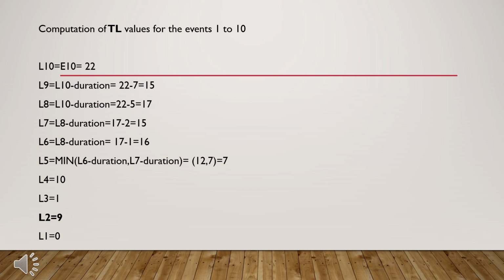L5 equals min of L6 minus duration, L7 minus duration, equals 12, 7, equals 7. L4 equals 10. L3 equals 1. L2 equals 9. L1 equals 0.